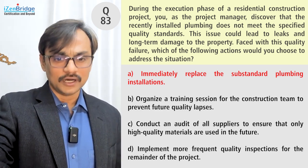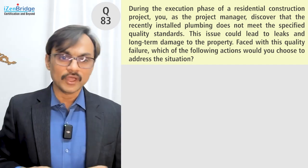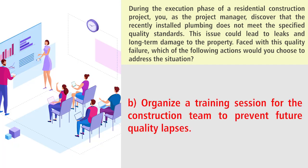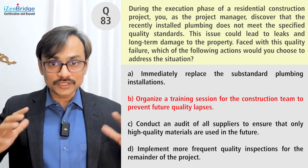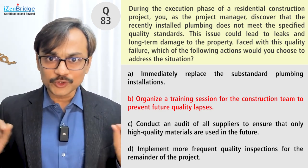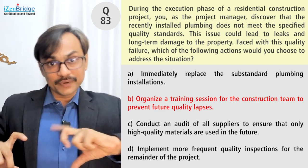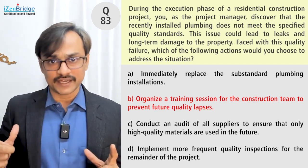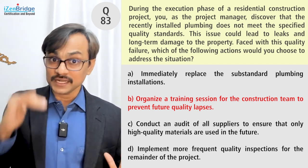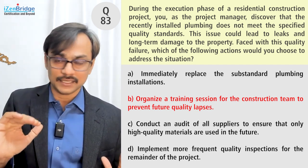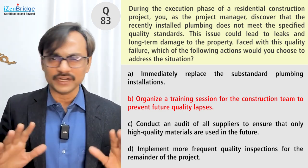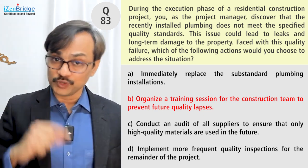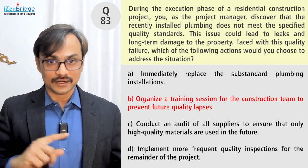Option B: organize a training session for the construction team to prevent future quality lapses. This is not taking care of the current issue. The question is asking what you do about a quality failure right now, and jumping into preventive actions before corrective actions is not a good idea. Option A is still better than this. I need to look for a better option if I can find it, but Option B is talking about prevention, and I need to do corrective action first, then preventive.